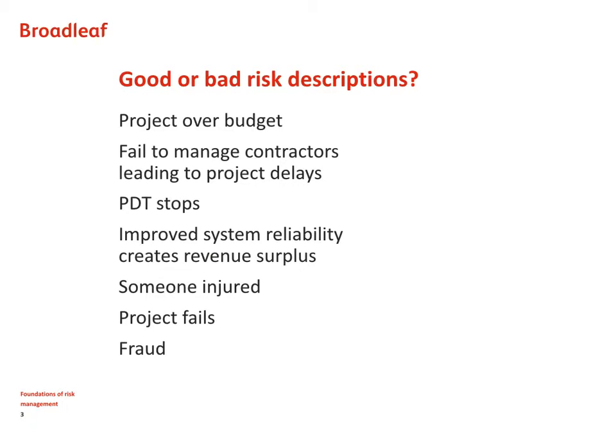Fraud is an interesting risk description because really it's not a consequence or it's not even an event. It is merely some perceived effect from the event on the organisation. And whether the fraud is material or not really is a question of significance and also the organisation's objectives. So fraud is really not a good risk description. Indeed, it's not even a form of risk.